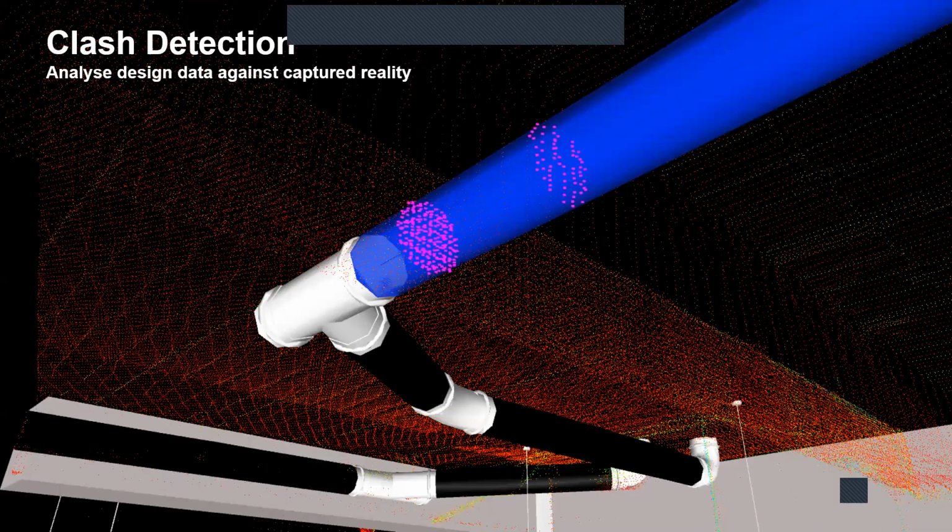There are a few cases where we have one design for HVAC from one contractor who is working on installing these pipes for AC ducting. Another company is constructing the building, and they have never spoken with each other. They were both given different contractors by a main contractor, and they never bothered to talk and understand each other's geometry. They just had all different components ready, cut as per the dimensions. And when they reach the site, they analyze and identify, oh, this cannot be done because the construction company has built another pillar in the way, and now the existing HVAC plan doesn't work. And this might be costly.